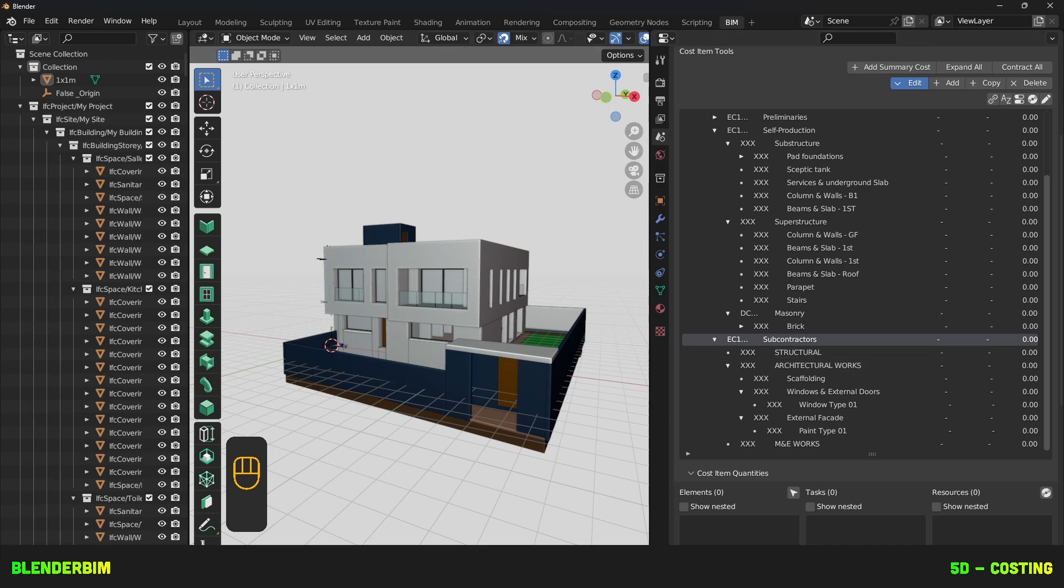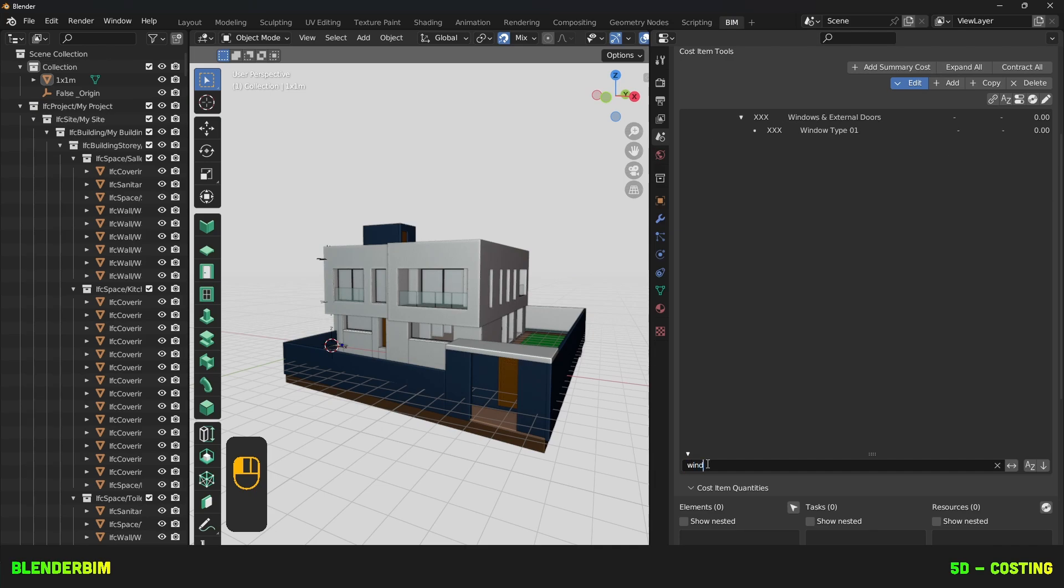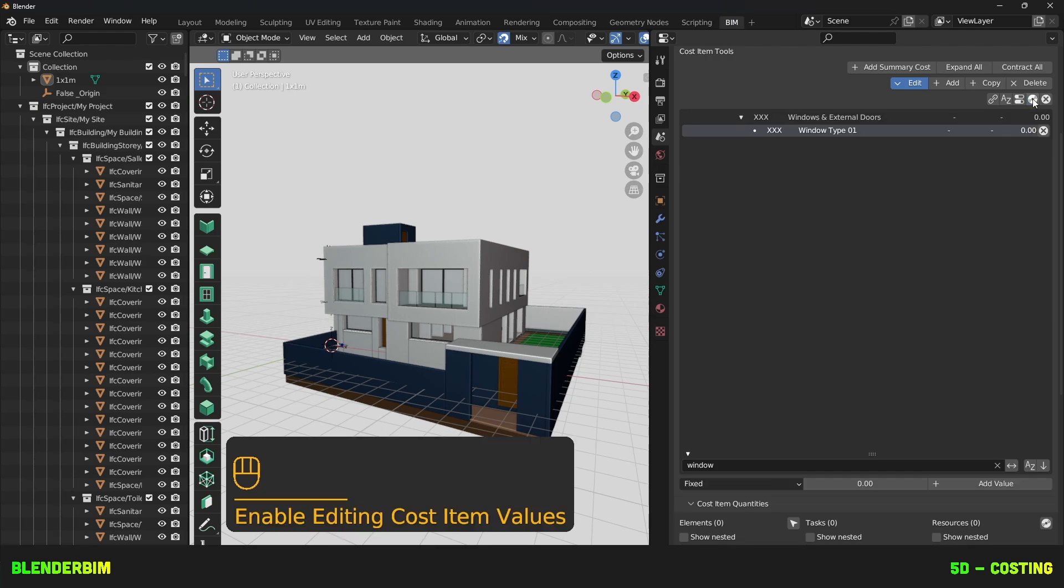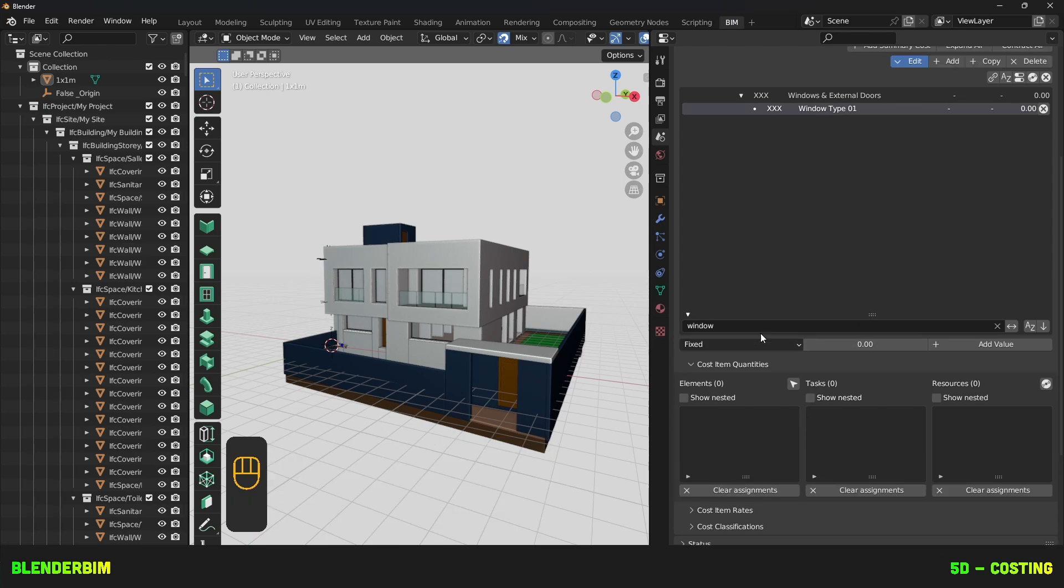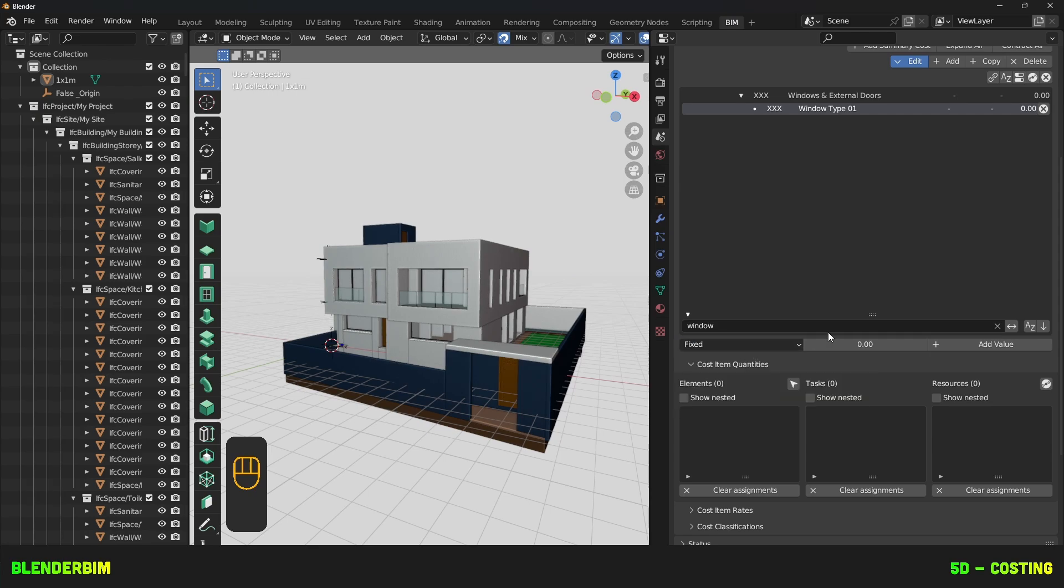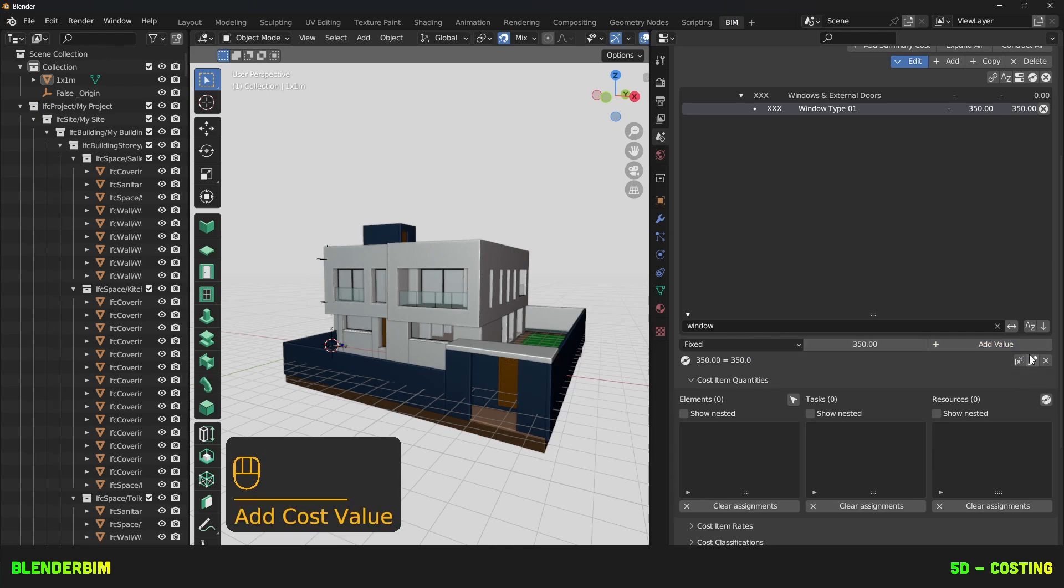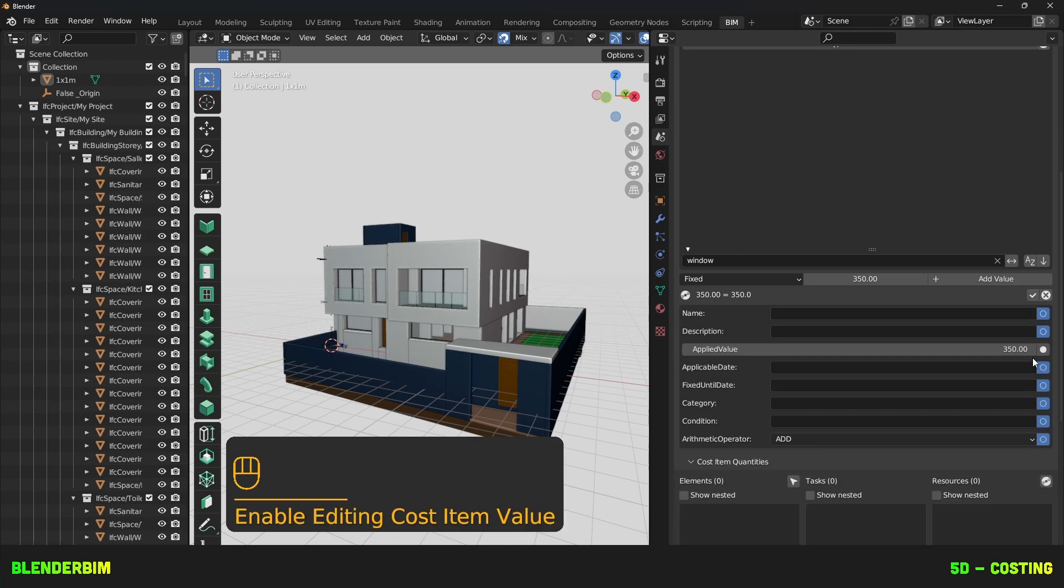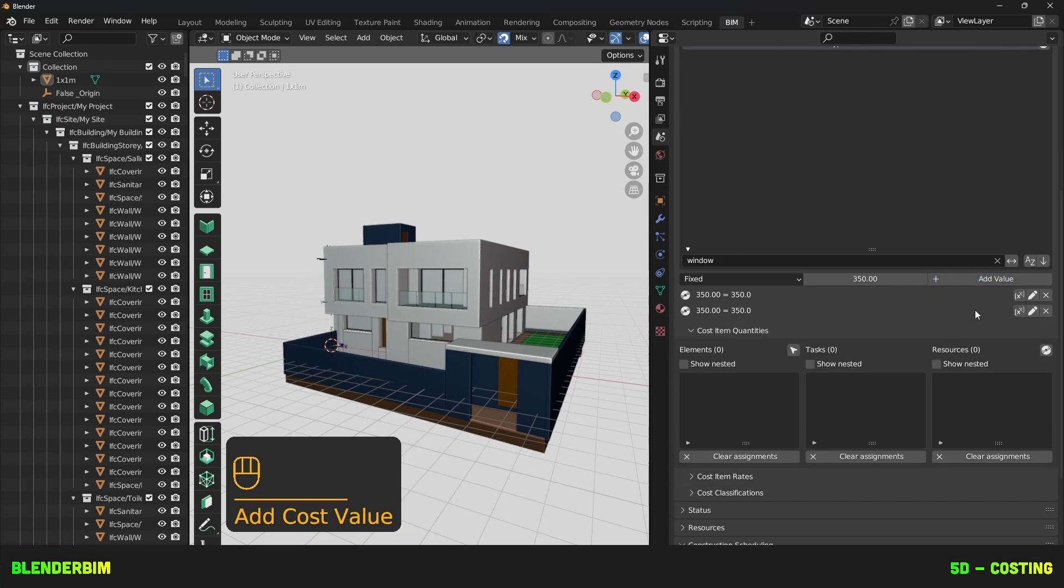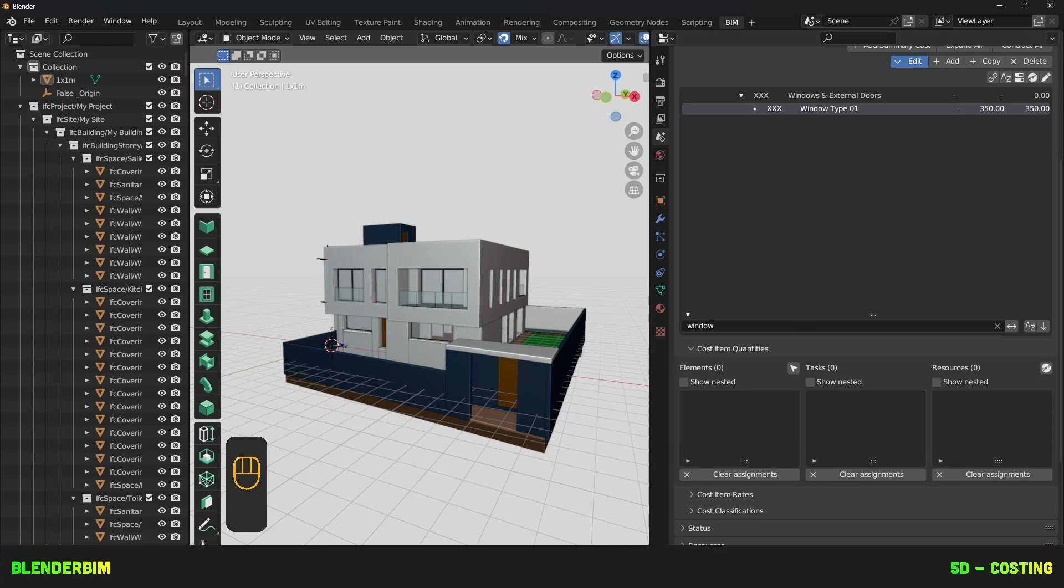Let's add a Cost Rate to a certain Cost Item. We can look for Cost Items by searching with their name in this field here. So, I'll use my Windows, and then I'll press on the Coin Like icon to add a Fixed Cost. We can see here, below the tree, there'll be a dropdown where you can choose from Sum, Category or Fixed. We'll keep Fixed for the moment, and we'll write 350 and add this value. This will effectively create a Cost Value. We can create as many as we'd like, which will sum up the Cost Values.